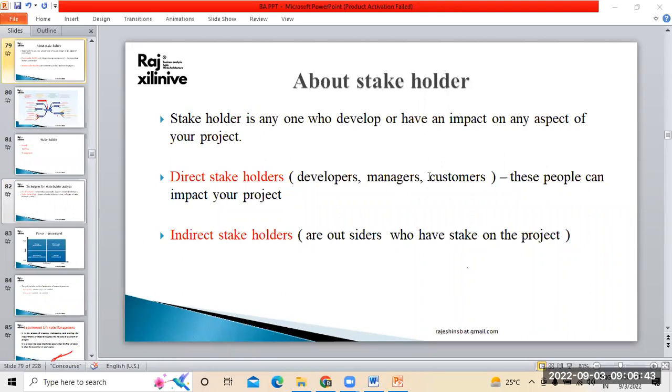But why is the project manager involved? Because technical people will also be involved in it. Even the architect and other people are involved. So the project manager will ensure that everybody attended. The project manager is responsible for the whole project. He has to observe whether the points we were discussing were clear or not. Is there anything we are missing? Being a business analyst, you are focusing on the business requirements. Maybe with reference to the project timelines, sometimes you may miss those points, which will be covered by the project manager. That way, project managers are useful in the JAD session.